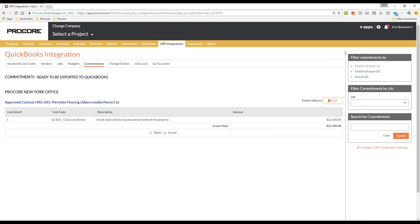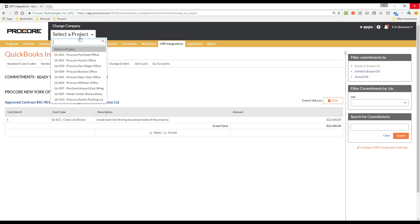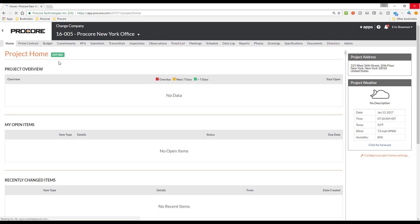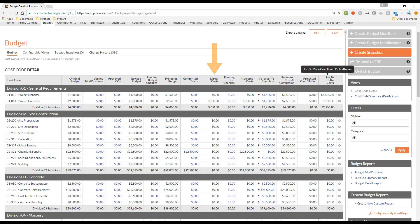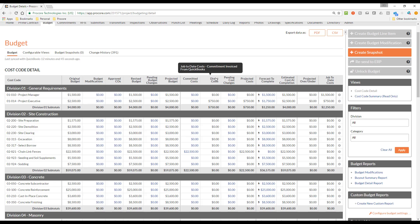Back in Procore, the commitment no longer appears on the Ready to Export filter and has been moved to the Synced filter. One of the biggest benefits of the integration for your project managers is seeing real-time actuals flow from their accounting system into the Procore project management system, all inside of the budget. Now that we have a synced budget for this project, we can see the job-to-date cost being pulled in from QuickBooks right into the budget. If I hover my mouse over the column heading, this is information being retrieved from QuickBooks. Another area in the budget that may display cost information from QuickBooks is the Direct Cost column. You can decide if you want to populate the values manually in Procore using the Direct Cost tool or have it flow in automatically from QuickBooks.